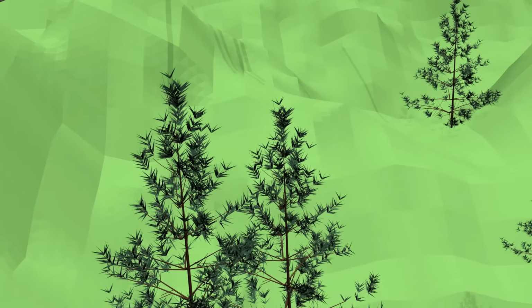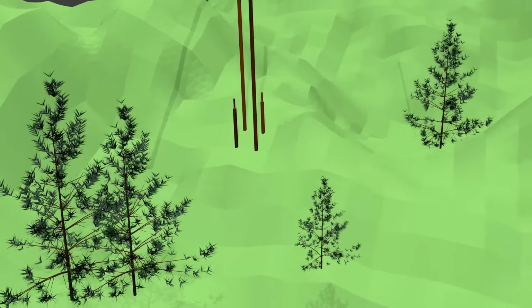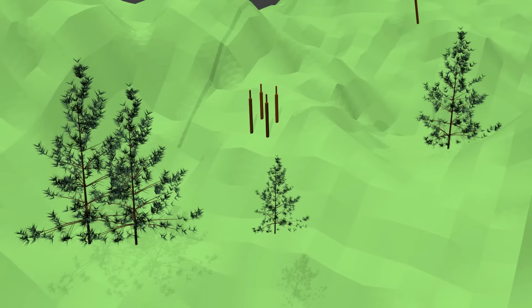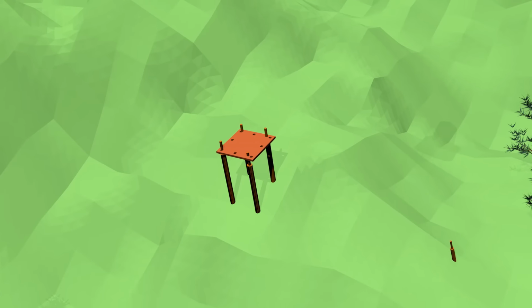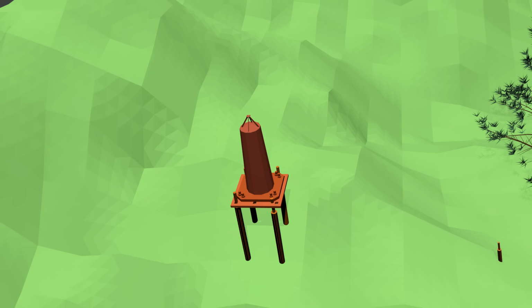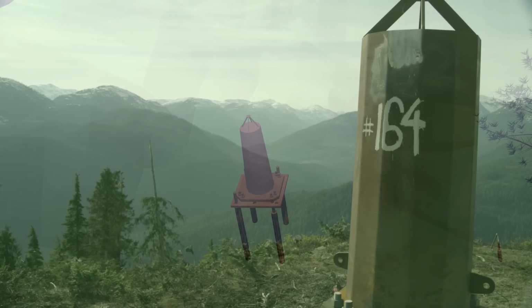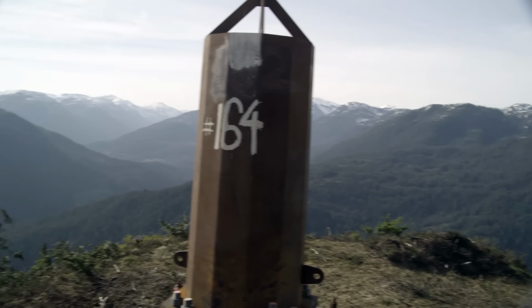The first year of this planned 2-year project is the foundation year, in which from 3 to 6 micropile foundations, plus guy wire anchors, would need to be drilled at each pole site. Later, pile caps would be placed and balanced. The final step was the installation of a unique Wilson-developed device nicknamed the stovepipe, which would be leveled and bolted down. End of year 1.